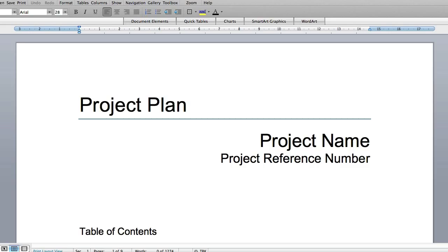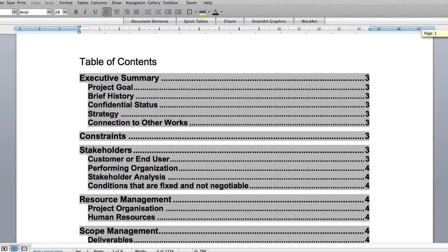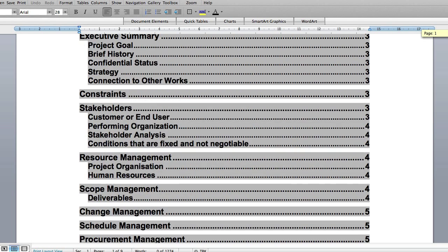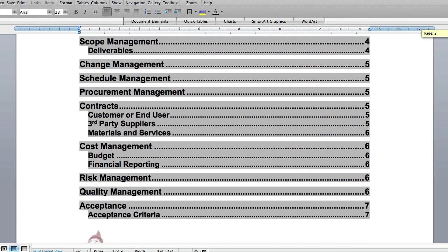And include an executive summary at the beginning. It's a living document that gets updated as the project progresses, so include all the changeable data as appendices. Then you only need to update the appendix and not the whole document. And here's the table of contents. Oh, it's on 2 pages, ending with a whole bunch of appendices.